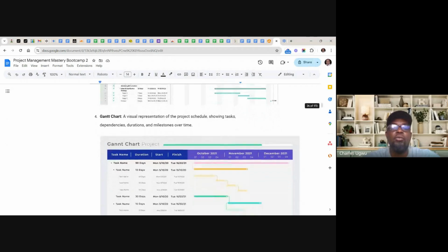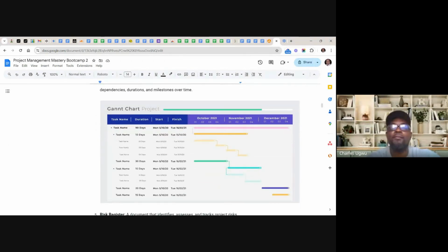And this is another way a Gantt chart looks as well. This is a project plan; you are planning your project. This is where you start converting the work breakdown structure into a plan: when you start adding the duration for every task, you start adding the cost to perform it, and you start adding resources like the project manager or business analyst who is going to do it.